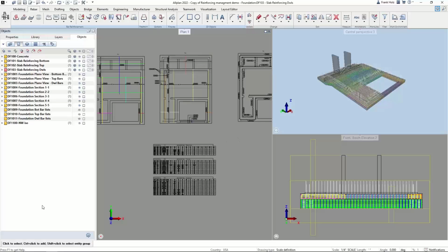So as soon as you release something to one of those systems, ASA or Soule, and again, we can do an Excel spreadsheet, etc., we basically change the status of that bar to a listed bar. Therefore, we cannot send out again unless you physically change the status of that bar. So what Frank has done is showed you that, hey, we've already released all the releases on this particular drawing file. There's nothing else. If bars have not even been assigned a release, they will not be released as well. You need to physically have a release ID on a bar in order to send it out to Fabrication.